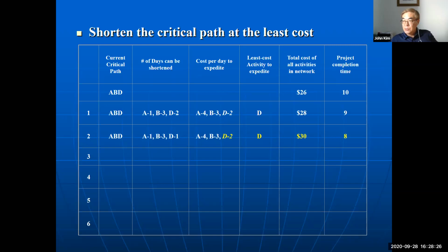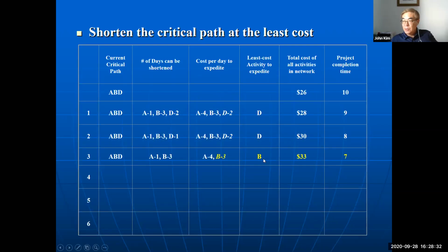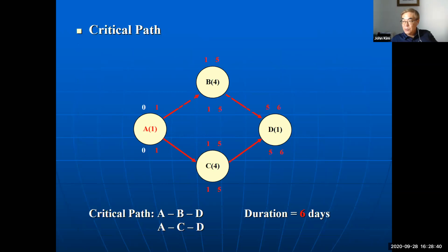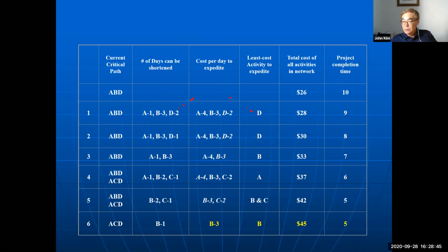So using this crashing of possible activities, then add dollars and so on. Continue that crashing until, even if you add capacity or more machines, the cost increases but the time does not crash any further. Then stop there.